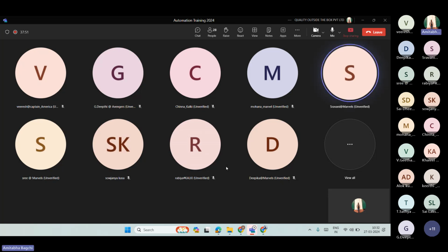Okay. And what is exit criteria? Exit criteria is when the QA team will say the product is ready to go to the market, and we are giving a sign off. That means the QA team is stopping the testing on that particular feature. When may it happen? The RTM is 100%. You may not know what RTM is, but RTM is 100%. We have a good test coverage of 95% or more. All the bugs that have been logged have been fixed and retested. Everything is verified, and all the test cases have been executed, and everything is passing.